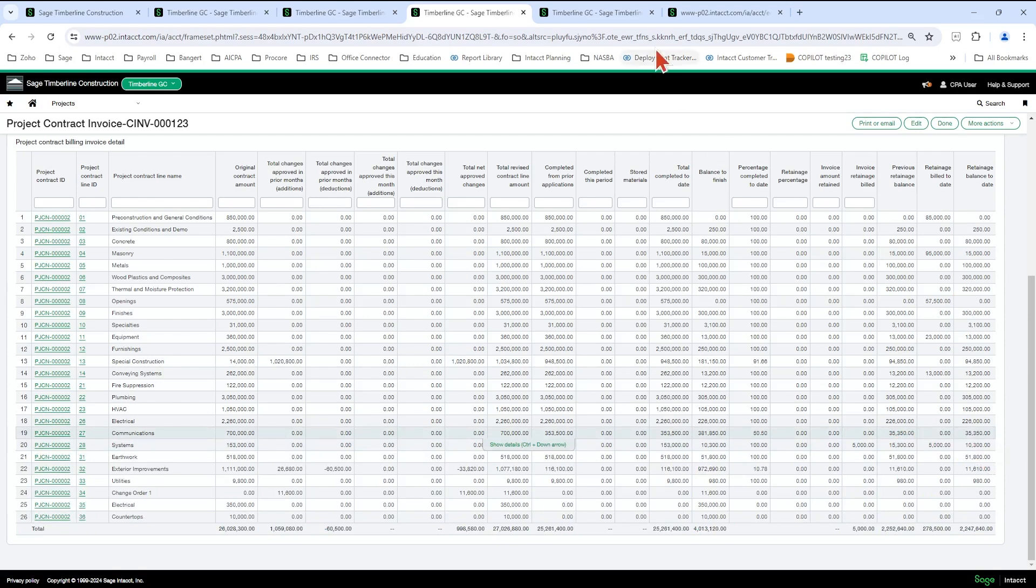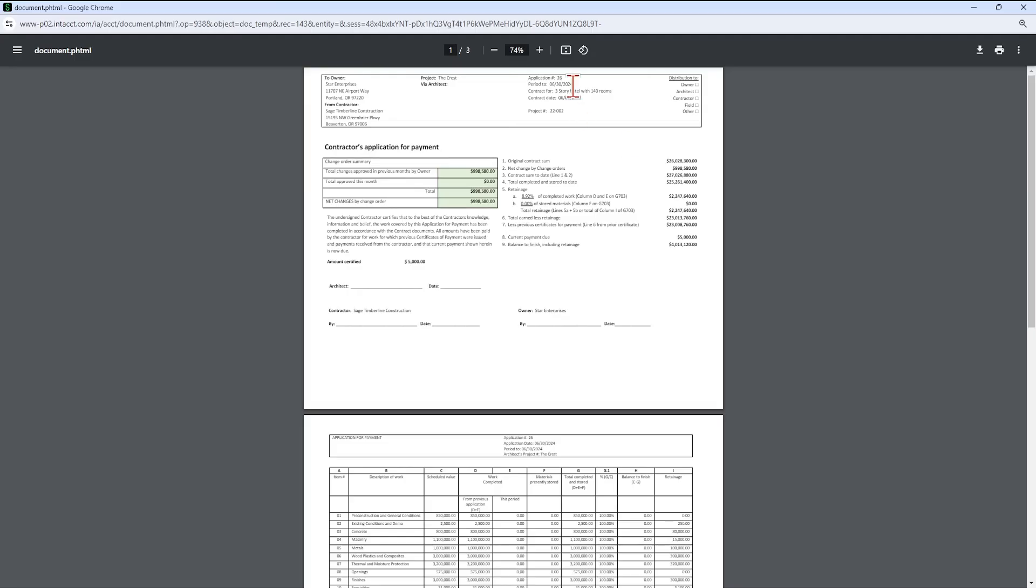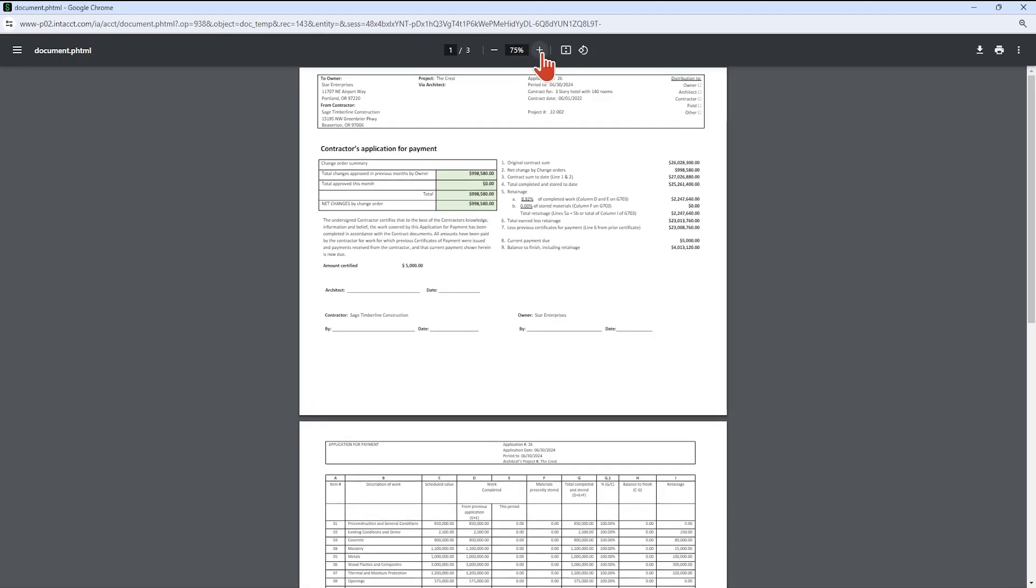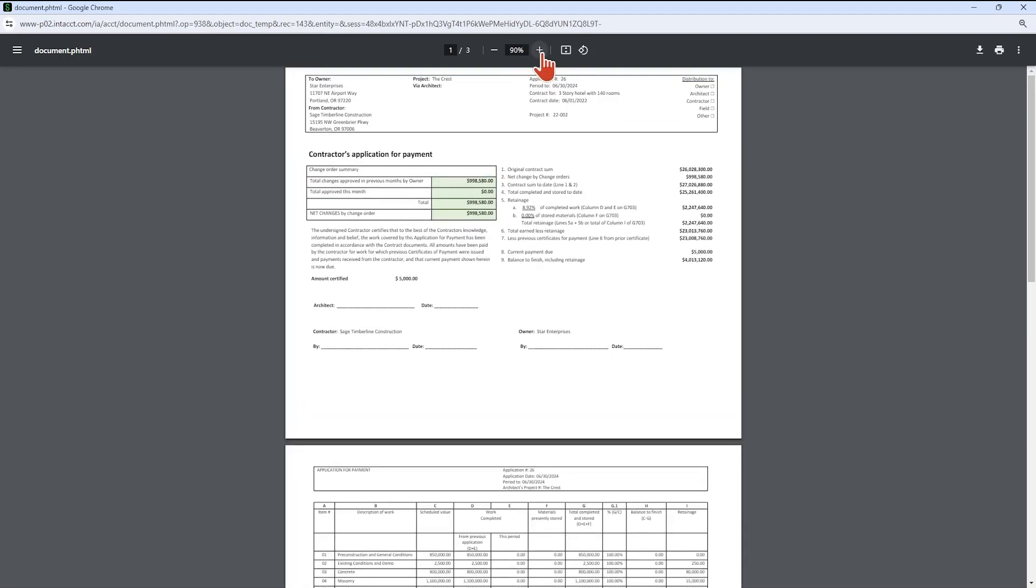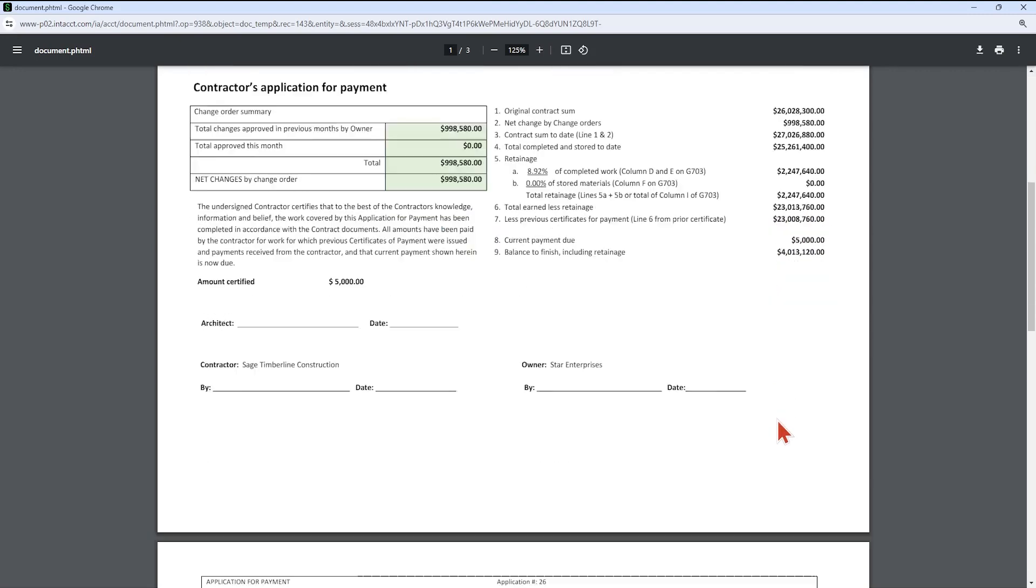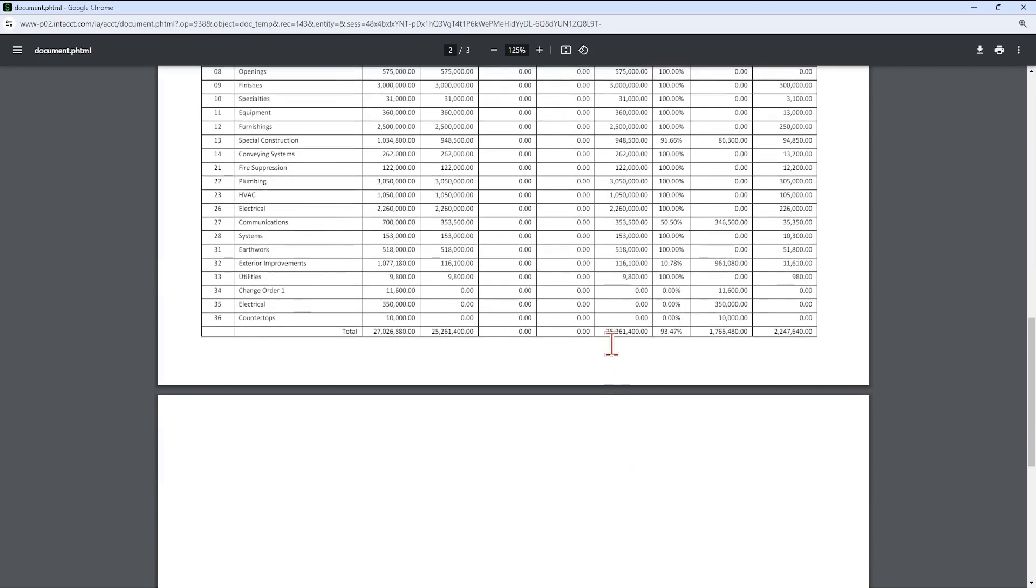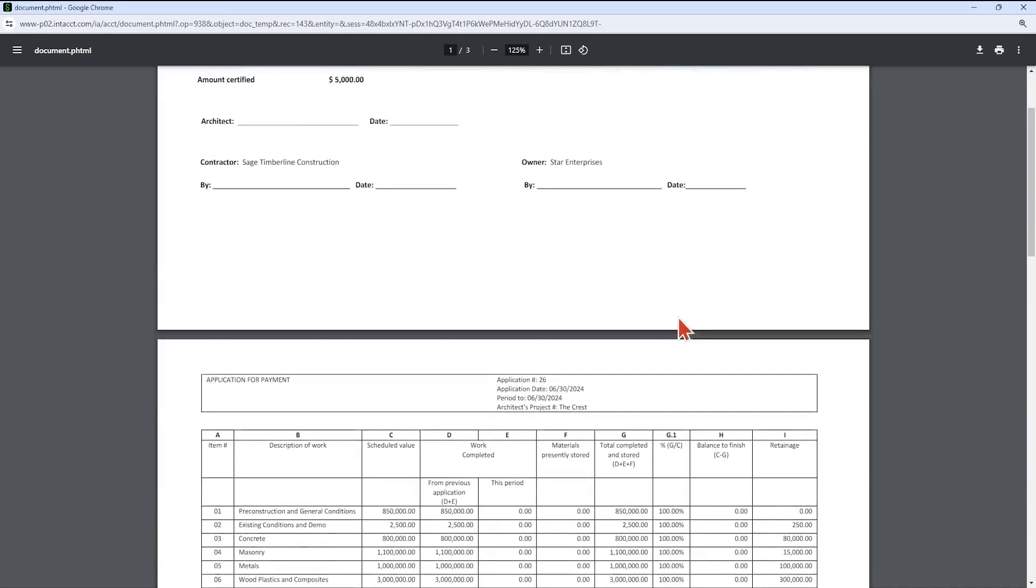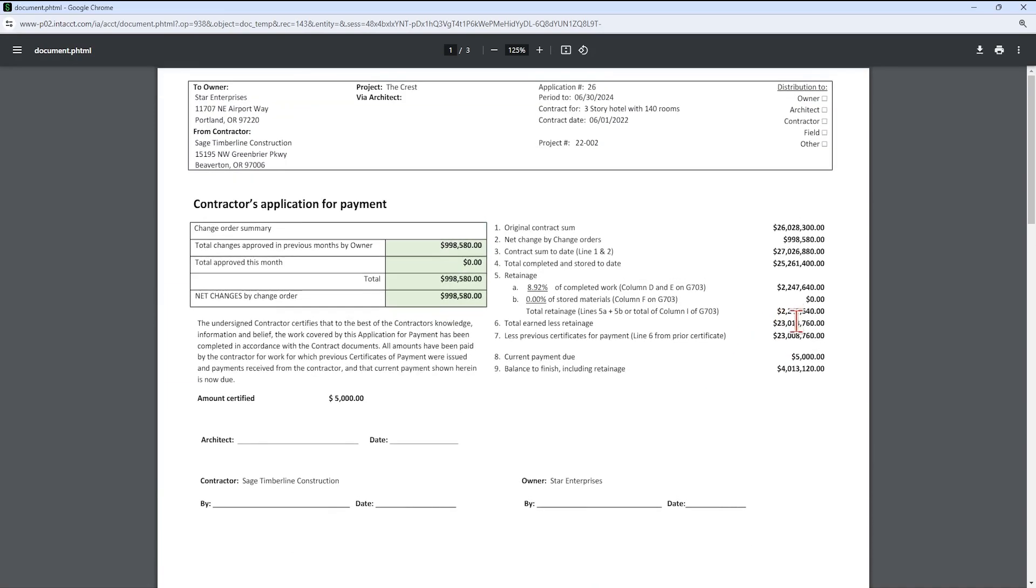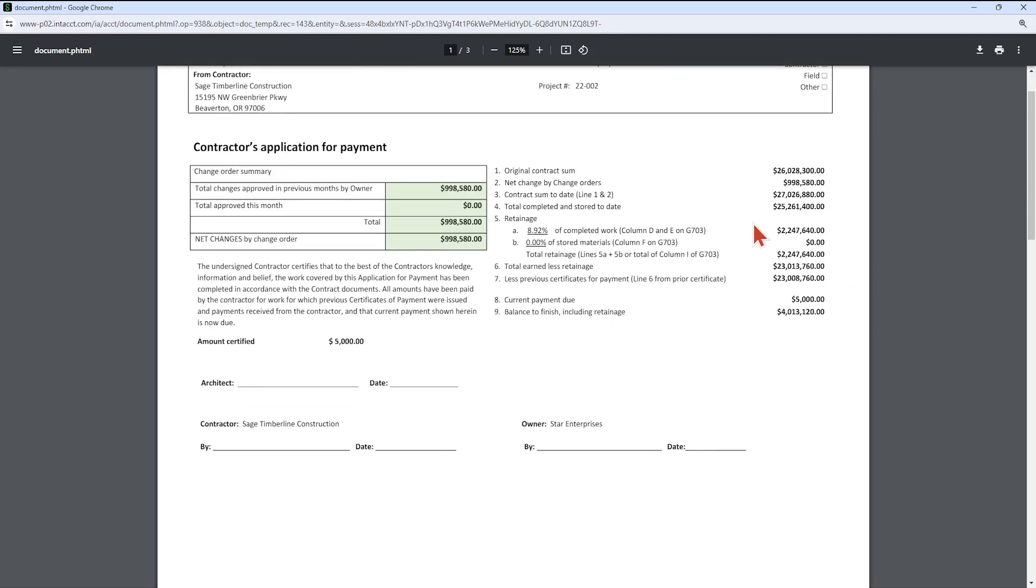Okay. So let's go back to the invoice form. And we're going to notice on page one, I've got my $25.261 million, my $2,247 in retainage. That should equal my totals down here, which it does. I've got my $5,000 here for my retainage that I billed. And my total earned less retainage is calculating correctly minus my previous certificates to get to the $5,000. So the front page here should match up with your totals, some of those totals on the back page.